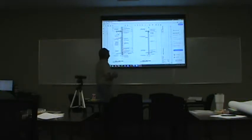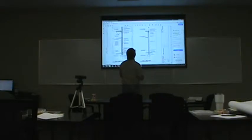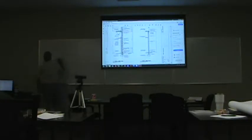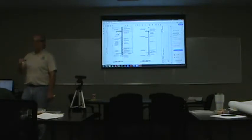They got a 2x. Now, that pre-finished metal drip edge is actually part of the roof, okay? And so they're really not giving us a detail on how to fasten that, are they? No. They're just kind of saying make sure it works. So let's just call it fasteners, right? And we know that the rest of what's shown there is by the roofer. The roofer's going to do the gutter, the downspout, the drip edge, right? He's going to do the roof insulation and the roof membrane.